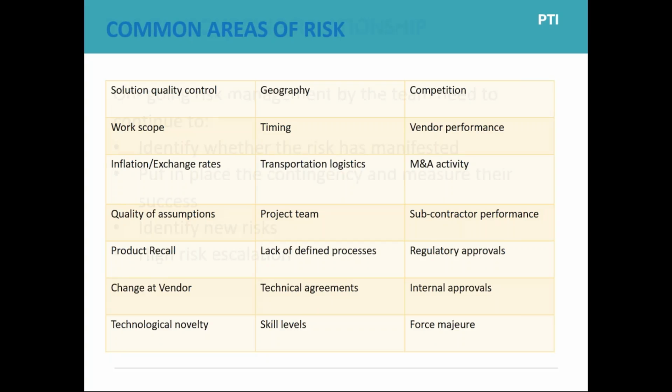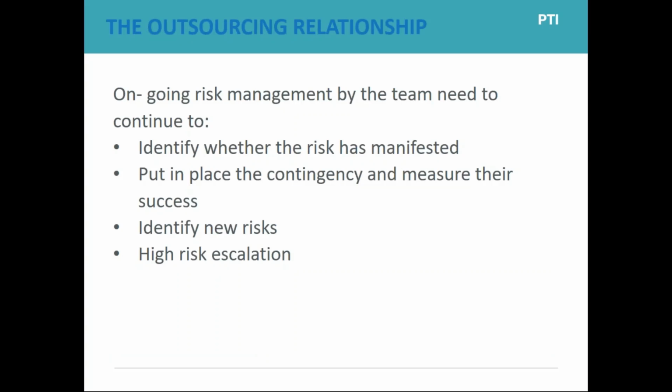So you've got an outsourcing. Who's going to do the risk management? And it does depend on how you've set things up and how big you are. If you're a very small company, a startup company with only a couple of people, then perhaps that is something that you will delegate totally to the service provider. But if you are medium plus size sponsor, then my suggestion would be that risk management is something you need to do as a sponsor and something you need to jointly do with your service provider.